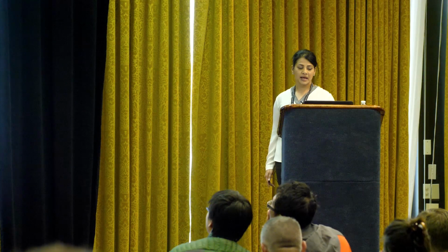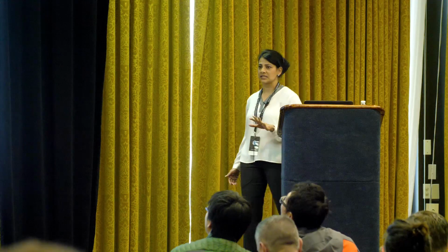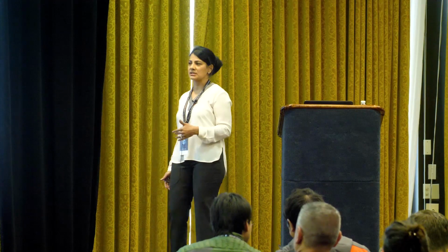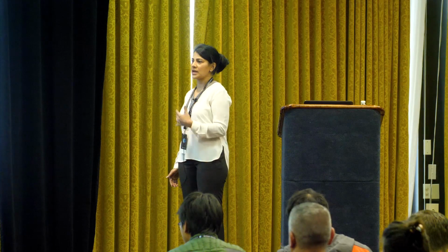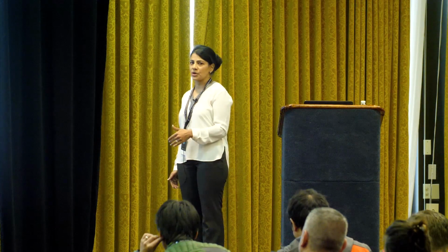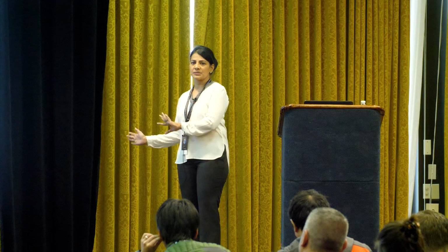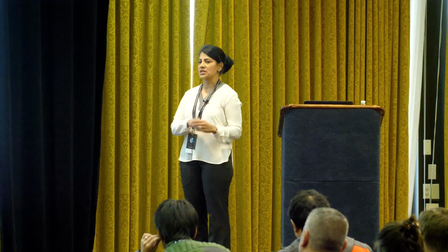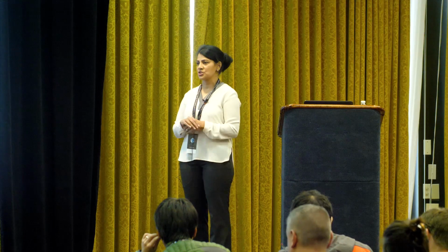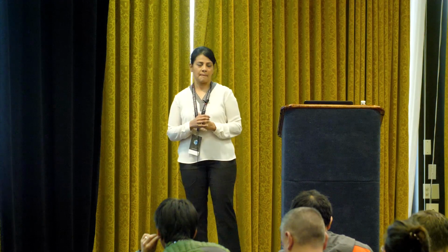I fully expect that once we get into actually testing a working implementation, we're going to learn about a whole bunch of things that we need to include, right? And that's what those 60 days at the end are for. We're pushing very, very hard. I've tried to front load as much as I can early on to the project to give ourselves time for any and all of those gotchas that could potentially get us closer to the end.